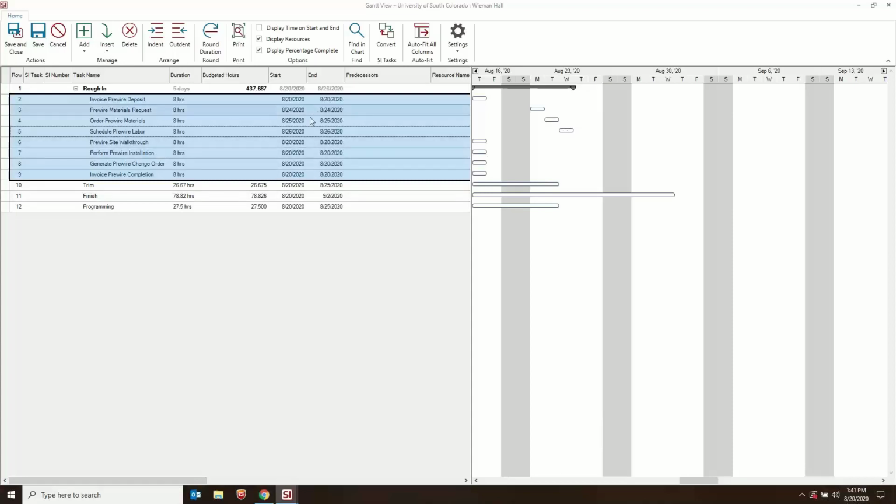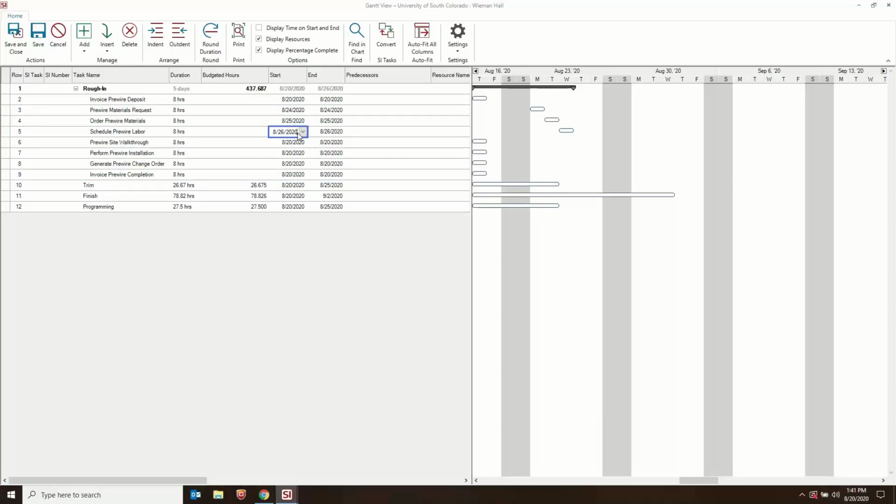Now, that's not to say you can't manipulate the time here. Absolutely. There's drop downs if you want to change them manually here. But let's say this walkthrough, for instance, is going to be over a few days. I can get my cursor there and stretch this. And you can see that it's going to react accordingly. So I've gone ahead and just stretched that out to show that functionality. So they can be dragged, they can also be stretched, and that's going to change the start and end and the duration for these.